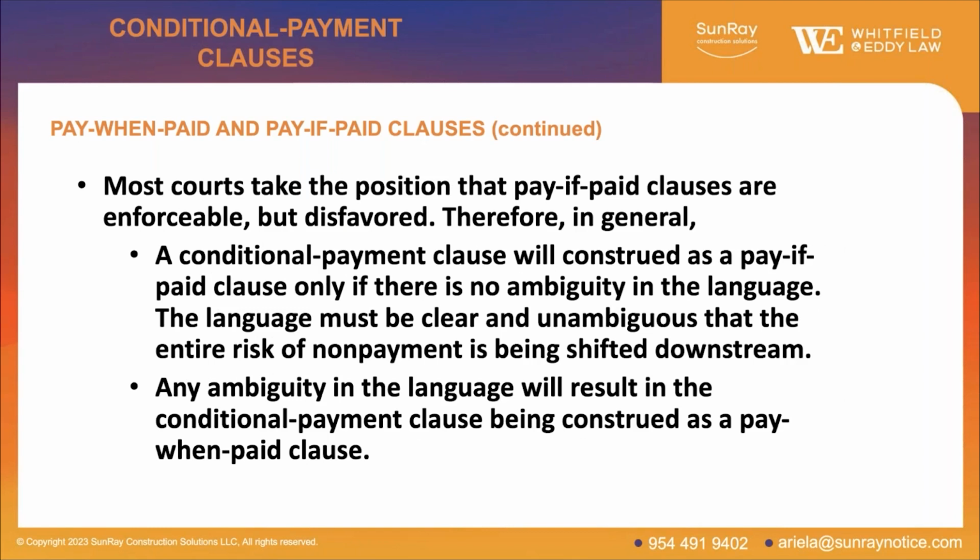What do courts say about this? Well, most states, now again, it depends on what state you're in. Some states have laws that make these provisions void or unenforceable. Iowa is not one of those, although if you take a look at Iowa Code Chapter 573, which governs public projects in Iowa, there is a prompt payment provision in Section 573.12 regarding payments to subs.